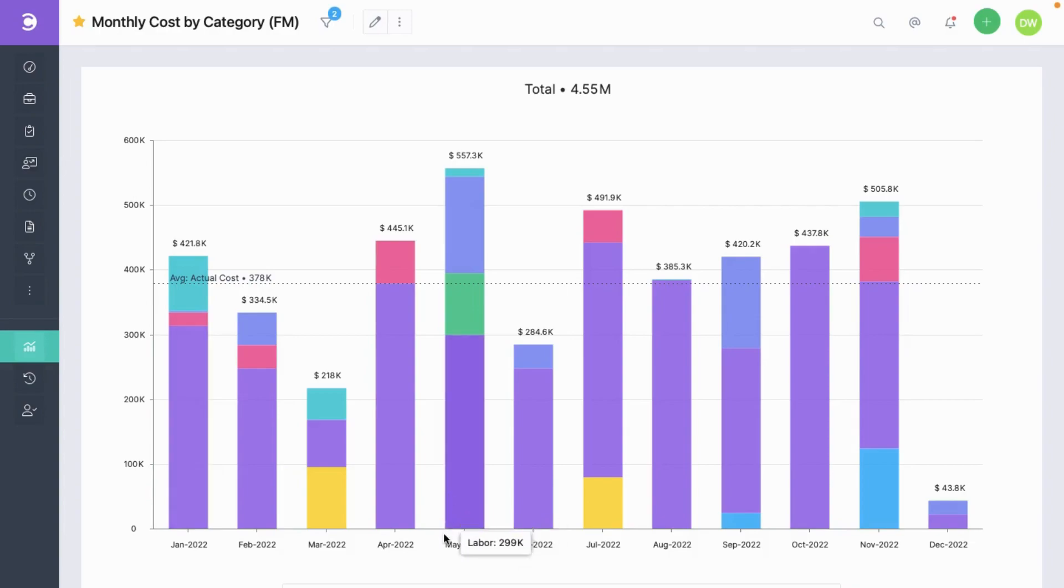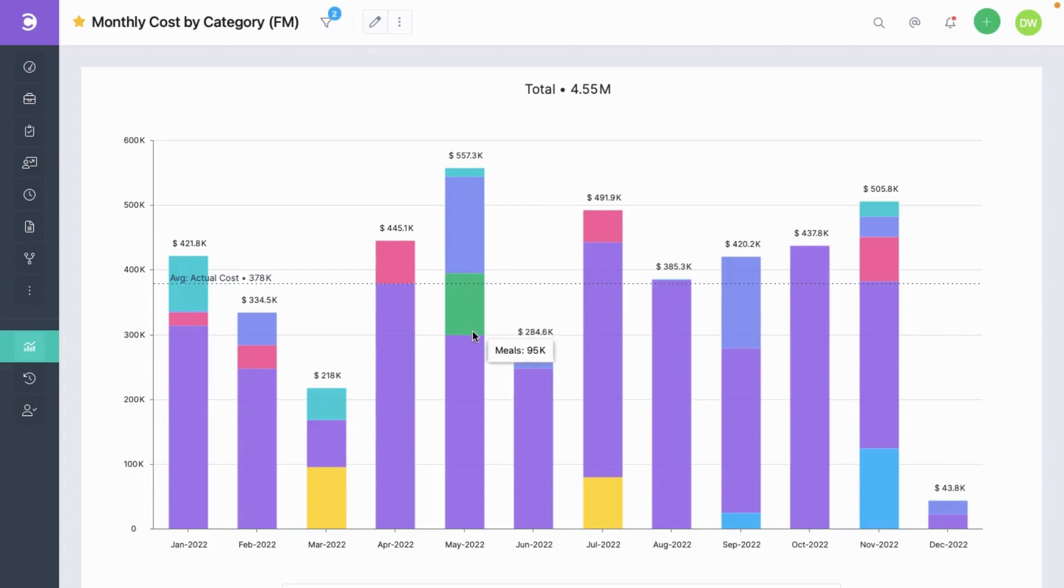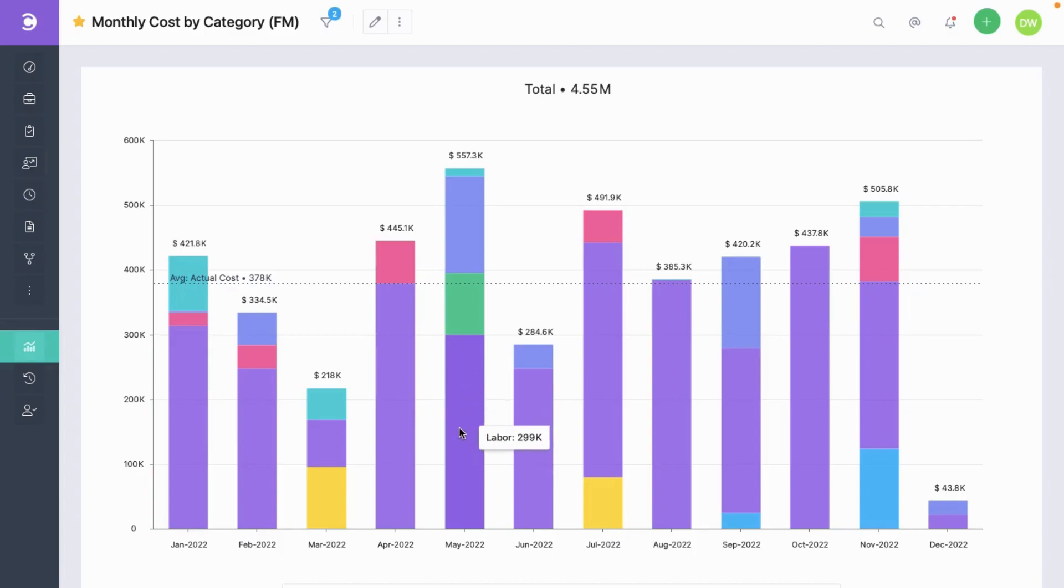For example, in the month of May you can see that the travel cost was $13,000, supplies were worth $150,000, meals for $95,000, and lastly the labor cost was $299,000. At the bottom you can also see the categories and their individual totals.